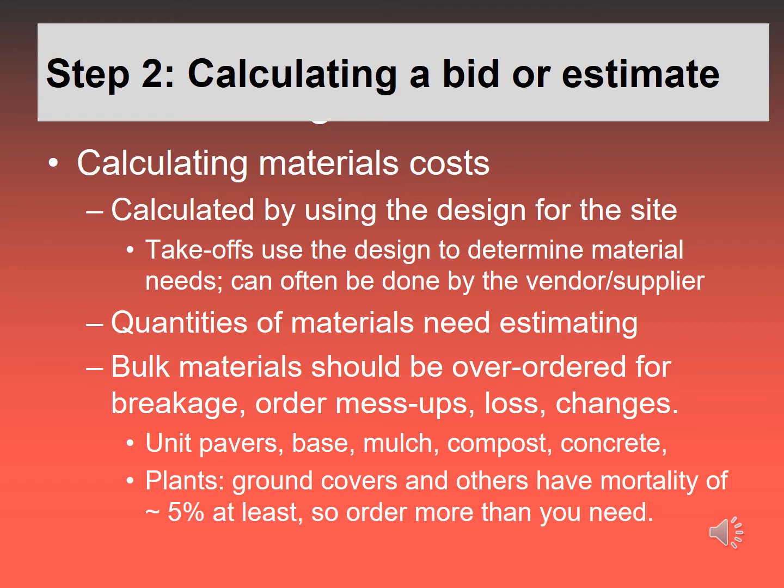And so something called a takeoff is created, and that can be done sometimes by the vendor or supplier, like Hayward Lumber here in town or Santa Barbara Stone, or Aquaflow too. They'll do a takeoff for you, showing you what the prices are going to be for all the things you need for a specific project and tell you the cost. They can do that, but you have to be able to do that too.